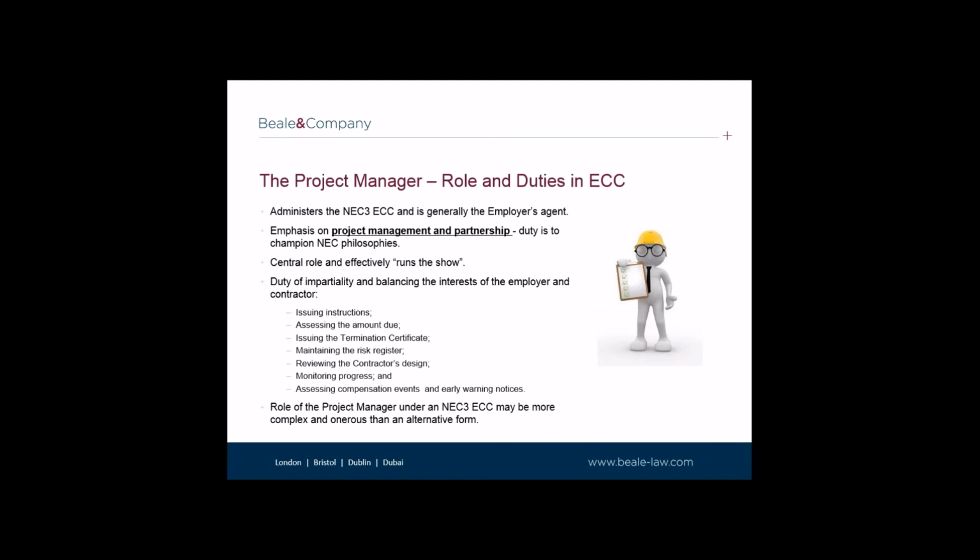Briefly now, we're going to take a look at the role of the project manager under the NEC Engineering and Construction Contract, the ECC, which Will described a little earlier. The ECC is administered by the project manager, and this is an appointment which many consultants are taking on. The project manager under the ECC is the employer's agent, and so sits on the employer's side.